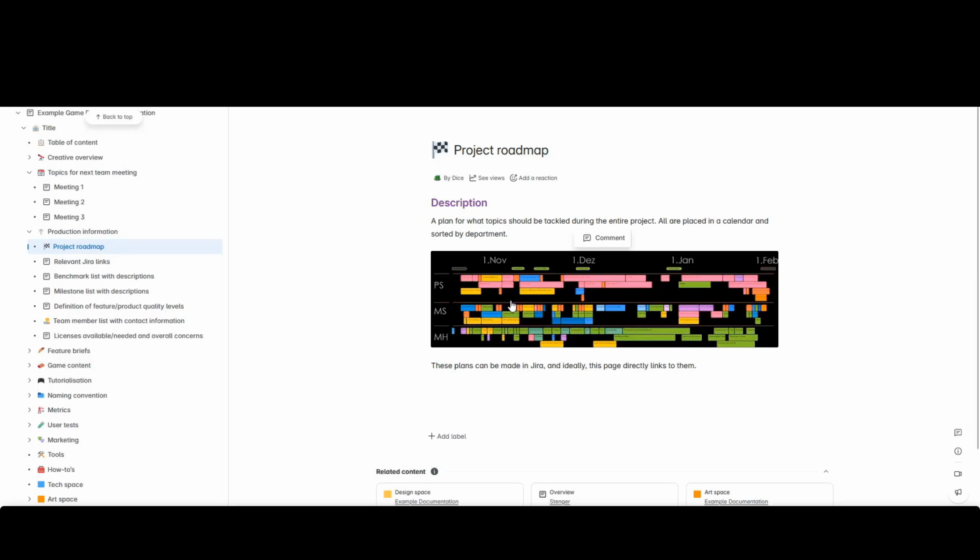So let's say we take two weeks longer for our player creation, and we have planned our roadmap to fill out our entire project space. This means somewhere else we need to scuff off two weeks, which usually means that something else has to be kicked out. We plan these roadmaps usually with a certain amount of buffer. It's usually about 25 to 30% of the project duration, so we can have overrun, but you should never try to actively use that overrun.